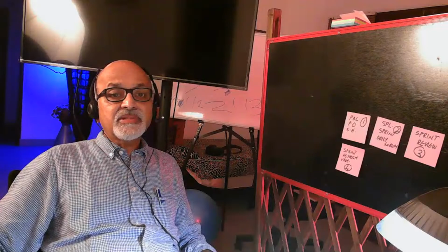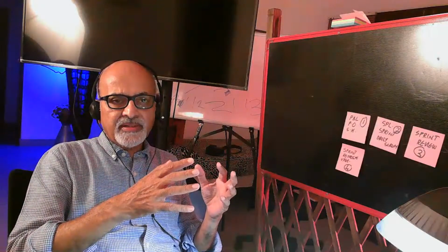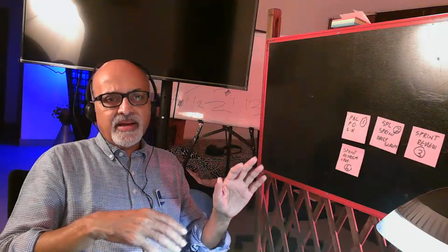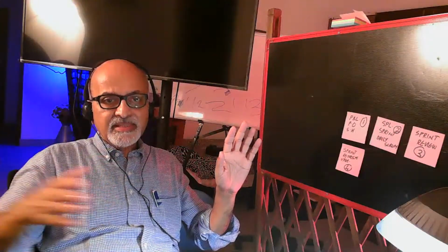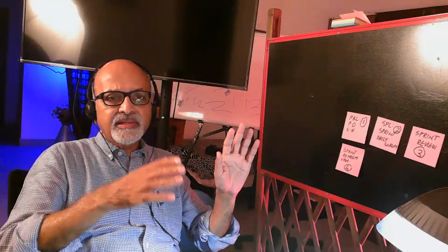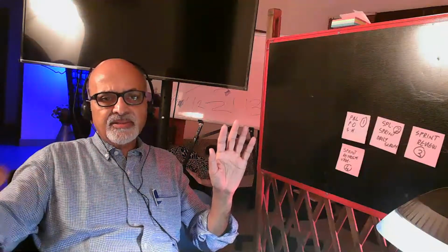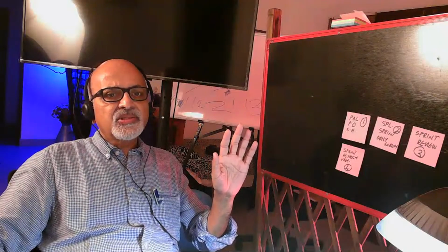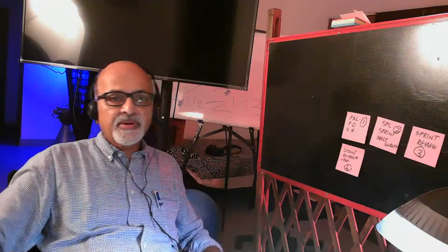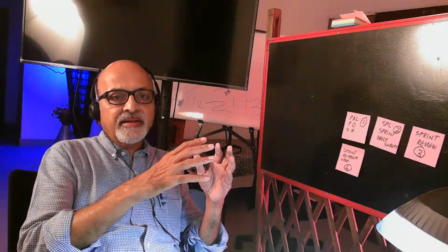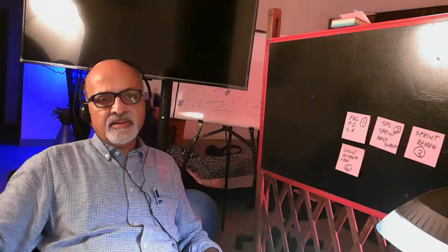Sometimes we hear terms like a release sprint and normal sprints. On one side we have the product backlog. Then we have to spread this product backlog into multiple sprints. And at the end of a series of sprints, we may have a release to the customer or to the market. Then again, another series of sprints. So at the end of every sprint, we don't release the product to the market. But at the end of certain sprints, we release the increment to the market. Then we call it a release sprint.